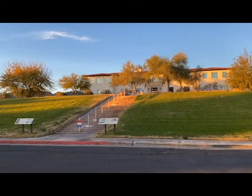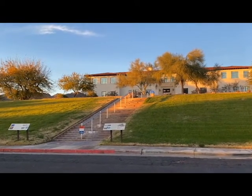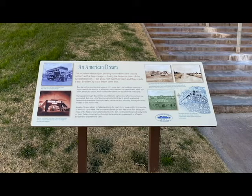So we sent those designs, the approximate locations, to the State Historic Preservation Office with renderings of what it would look like. And then we got a letter back from them stating it wouldn't have an adverse impact, and this is what they asked us to do for that, which was paint them the same color of the building so that they didn't stick out, and put an interpretive panel down at the street level so that as people came up, they could see what they're looking at and the significance. And we did all of those. In fact, we put three interpretive panels, two down at the street level, and one will be at the back patio very shortly. So that's how we consulted with them.